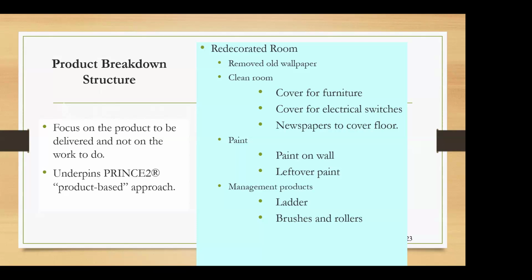So you can see how, when we come to the items, we are writing in terms of nouns, in terms of what are the things that we need, not in terms of verbs. That means we are not talking about what we have to do, but we are talking in terms of what the outcome should be.